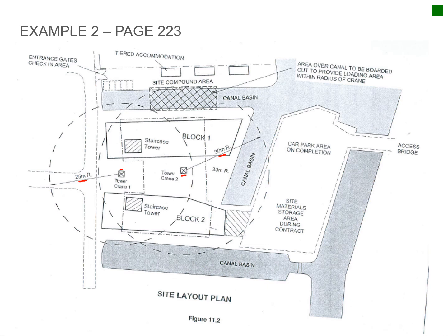So you've got fixed cranes, so you will use this first crane, say up to a point. You will see it's not in the basement. The basement is that dotted line going around there. So you will have, at one stage, done everything around the crane, and then you need to take down that crane and fill that section up later on. Once you're out of the ground, you can take that one out or get rid of that one and only leave the one.